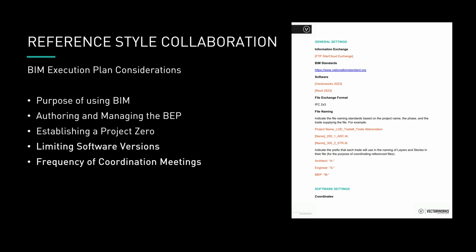The second specific standard is to decide what software version everyone is using and keep using that version if possible for the entirety of the project. This version also includes the IFC version that will be used.